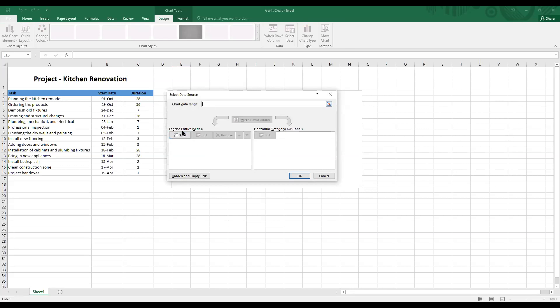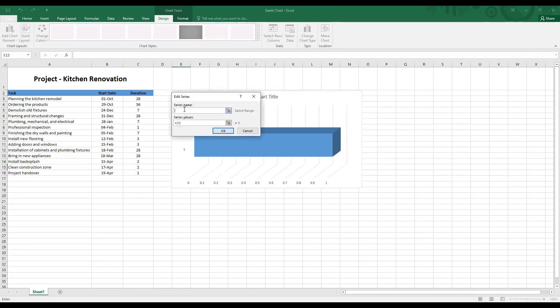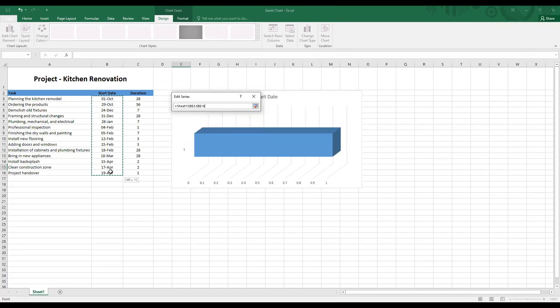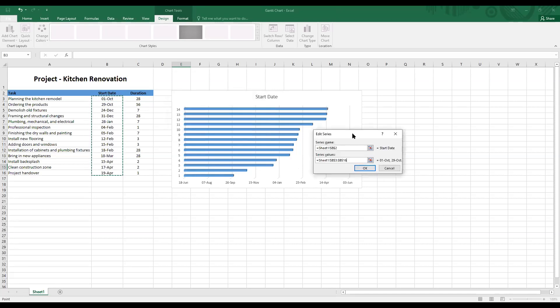Under legend entries, click on add. I want to now add information about the start date. Let me drag this box closer to the data. Under series name, click on the start date header. That's going to be the title of the series. Under series values, remove the default value and enter this range from 1st October till 19th of April. And look at the picture in the background. You can already see some changes happening there. Click on OK.